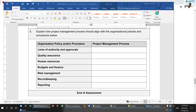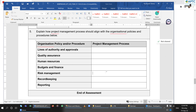Human resources: the job of HR is to provide you with the right amount of skill and talent in terms of people to complete the project and help with project tasks. Budget and finance: ensure you have enough funding and that your monetary aspects are taken care of — whatever you do should be within the approved budget. Next comes risk management: it is very critical to identify all risks in the process, documenting and categorizing them in terms of the impact they might have on your project. For example, if you are running on a very tight deadline and a task that could take five days is squeezed into three, any unexpected disruption — like a two-day lockdown — means you're risking a lot and need proper planning.